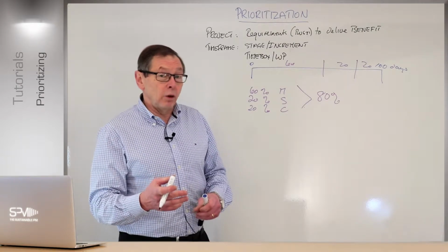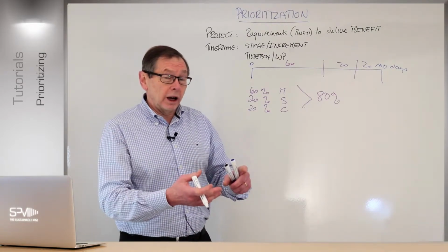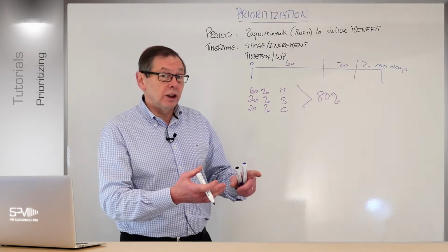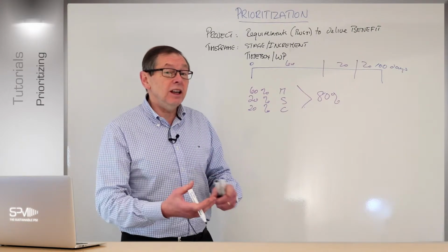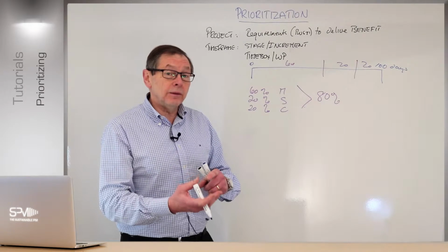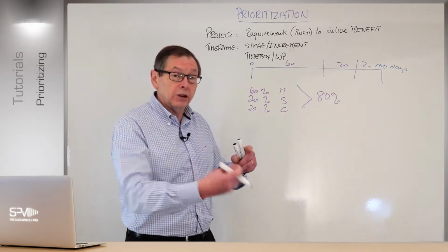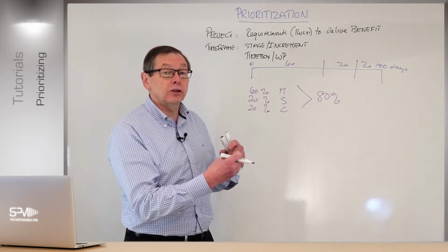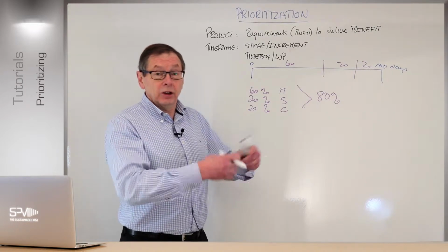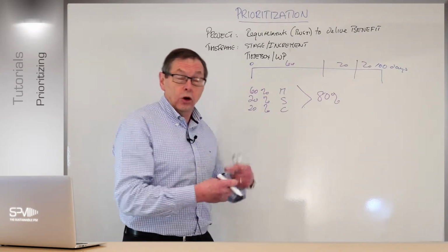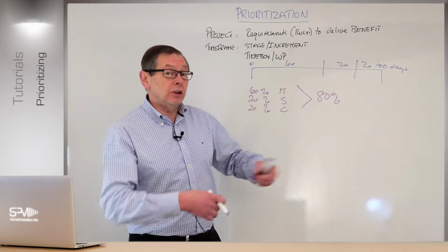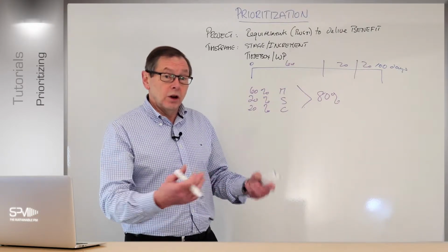Do bear in mind, by the way, that if that core work is only musts and shoulds, and I don't have any contingency, and I need to have some in the design phase, don't be afraid to add could have from another part of the project scope, because that's quite valid, because you either do it now or I hopefully will do it later. But it means I can build the time box with an extra bit of work.